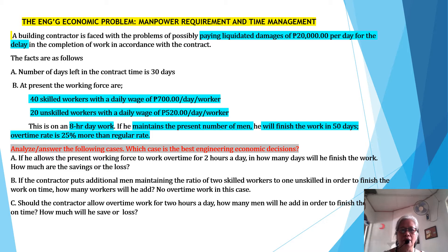with a daily wage of $520 per day per worker. This is an eight-hour day work. If he maintains the present number of men, he will finish the work in 50 days. The overtime rate is 25% more than the regular rate. Analyze the following cases.